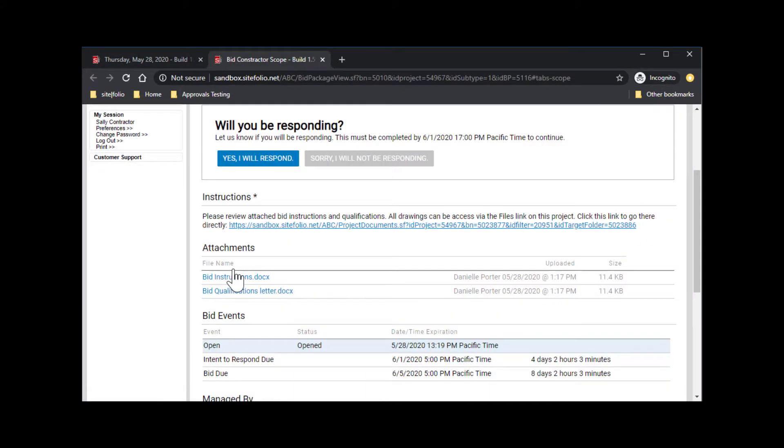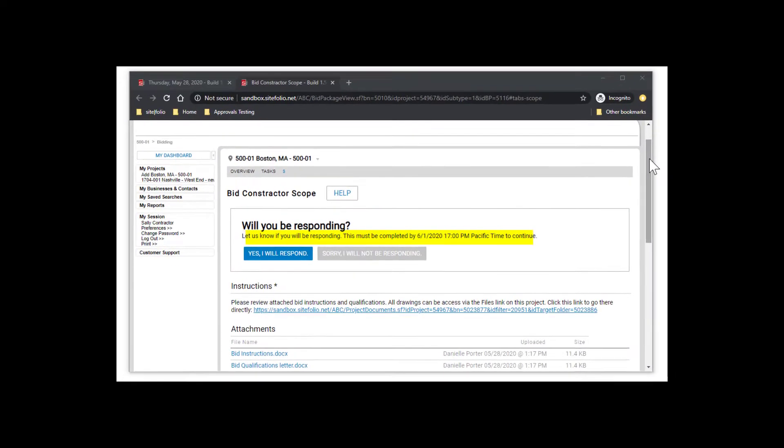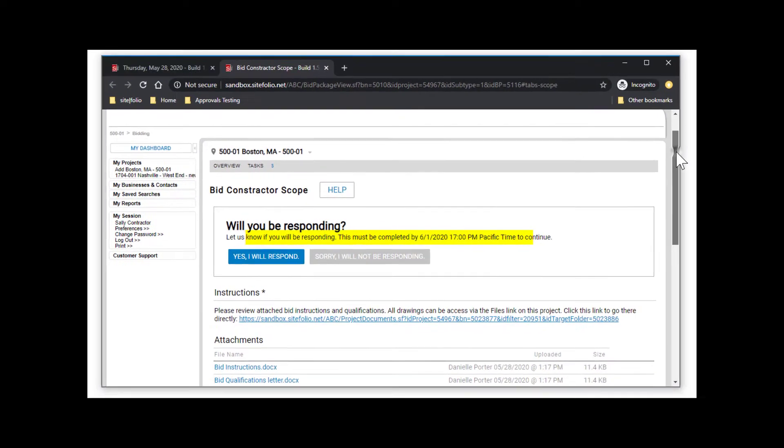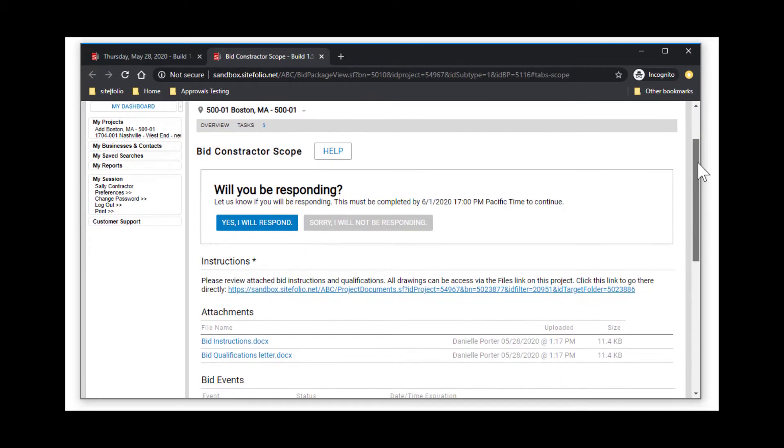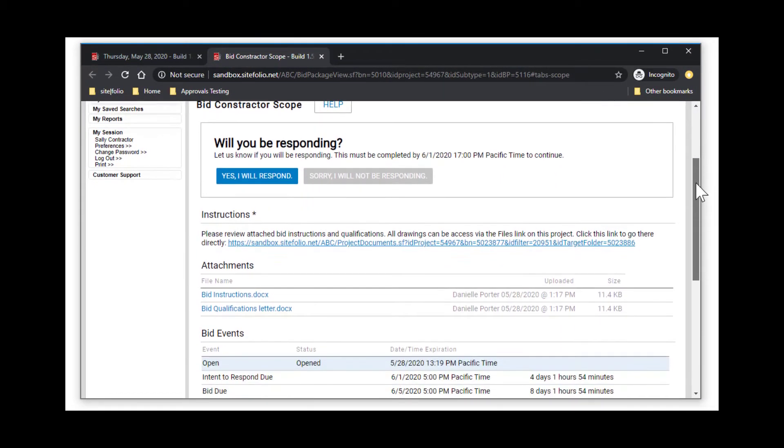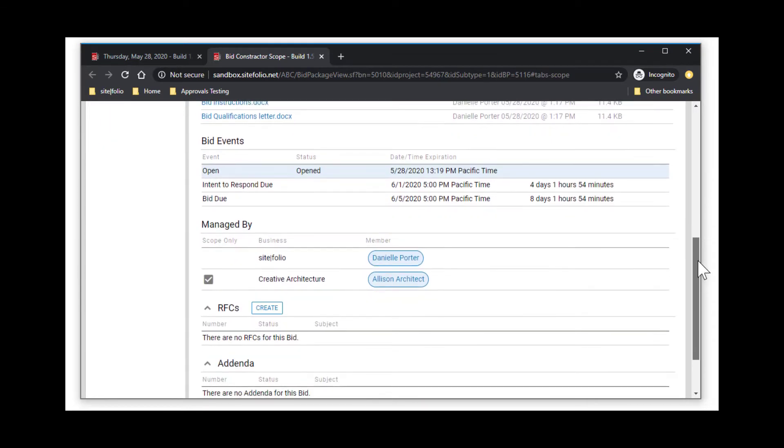When first accessing the bid package, take note of any important due dates such as the date required for you to mark whether or not you plan to respond. If your response is not marked by that date, you will be removed from the bid package.